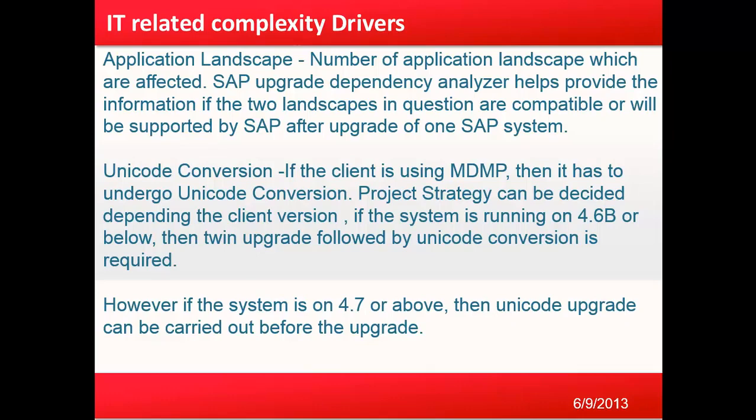For example, if I am performing an upgrade of an ECC system, whether my BW system or my portal will be impacted. Unicode conversion is another factor — if the client is using MDMP, it has to undergo unicode conversion. The project strategy depends on the client version: if the system is running on 4.6C or below, a twin upgrade followed by unicode conversion is required; if on 4.7 or above, a unicode upgrade can be carried out before the upgrade.